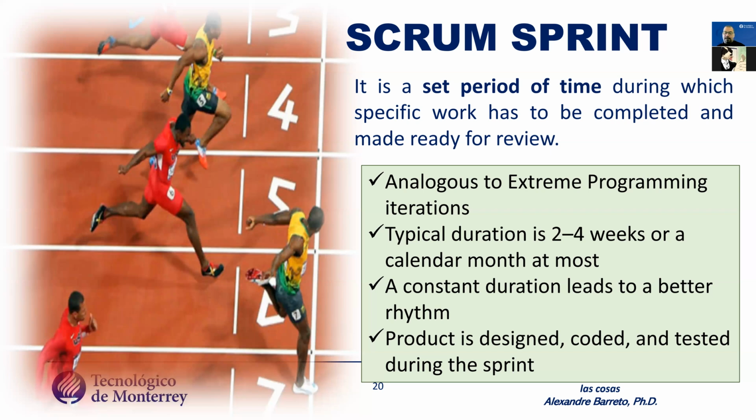It means that you need to rewrite your user story. If you estimate how much time you need and you see that you need more than 1 sprint, you need to split this user story into 2, 3, 4 user stories, because a user story, in our case, needs to be developed in 1 sprint. Did you understand? Yes.